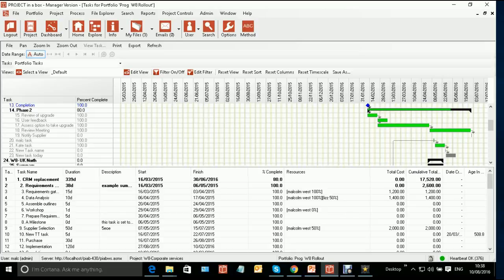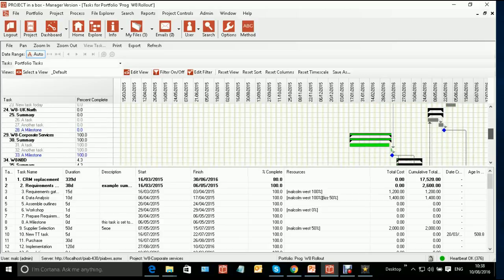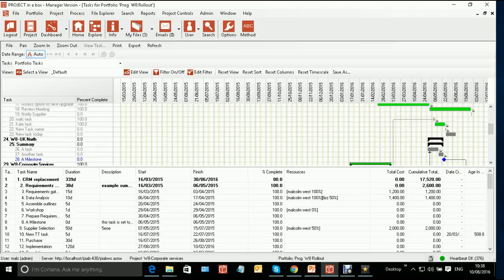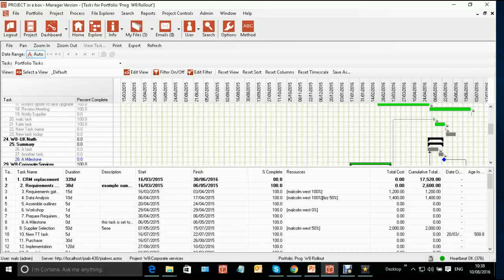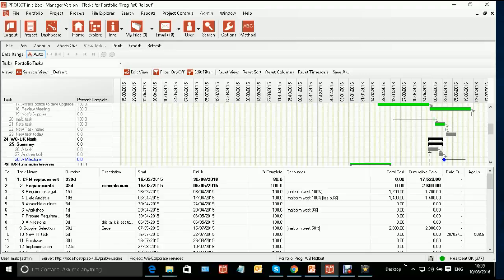When we're setting these up, though, it's important that when we're driving a task in a plan, that task isn't itself dependency-based within its own project plan. If that task was also dependent on other tasks within the project, that may cause some issues as it's calculated. Really, we should only be driving tasks which normally have a date set for the start rather than a dependency-based start. So then we only have one dependency to that task. It's the one coming in from the other project rather than multiple different dependencies.